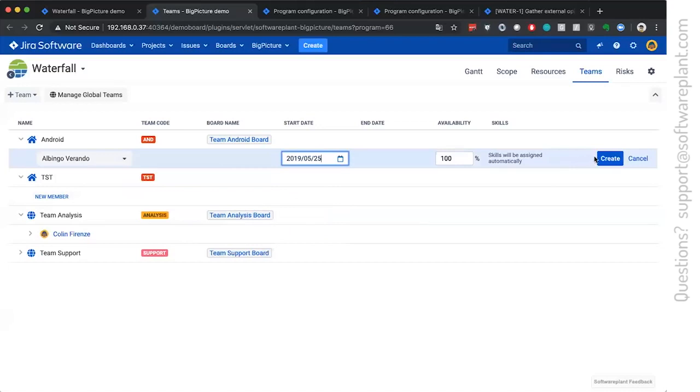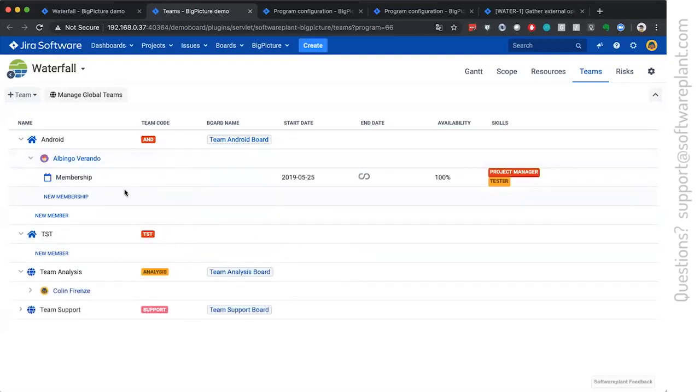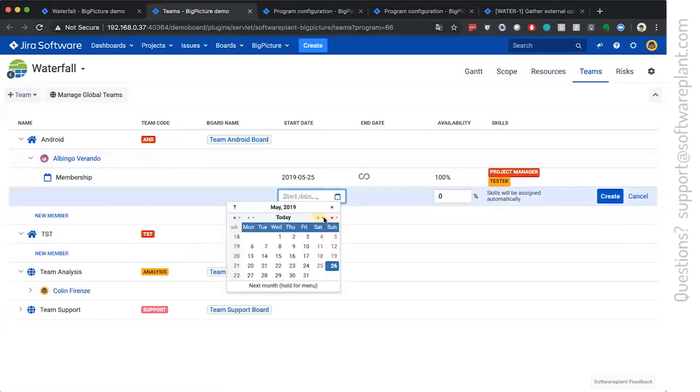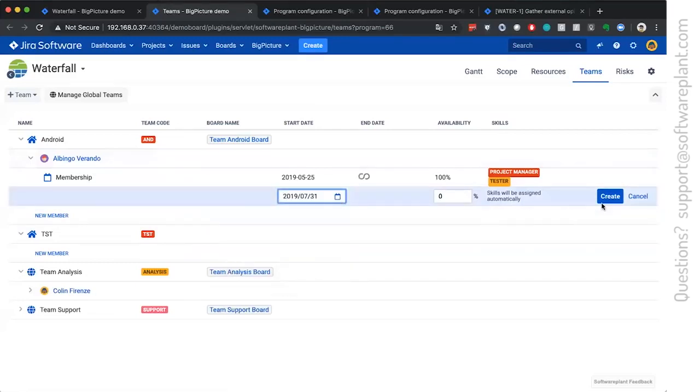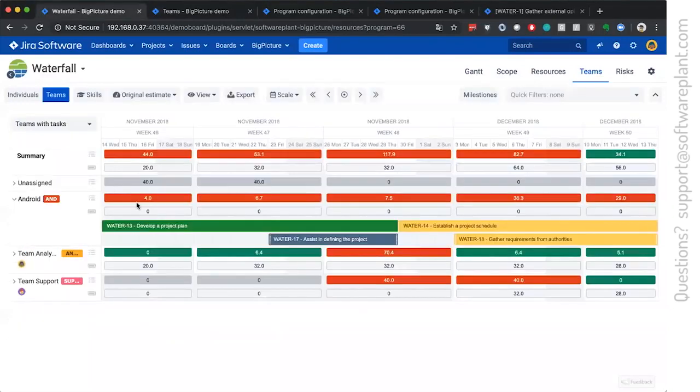And whenever adding a new person to the team, you define when this person joins the team, what is the percentage of availability, and then there she goes. For situations where somebody will leave the team at a known date, please just put in availability zero and she becomes unavailable. And this has direct impact on the capacity of the team.